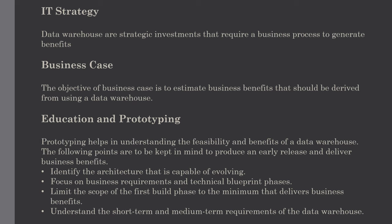The next phase is business case. The objective of a business case is to estimate the business benefits which will be derived using a data warehouse. These benefits may not be quantified, but the projected benefits need to be clearly stated. If the data warehouse does not have a clear business case, the business tends to suffer from credibility problems at some stage during the delivery process.